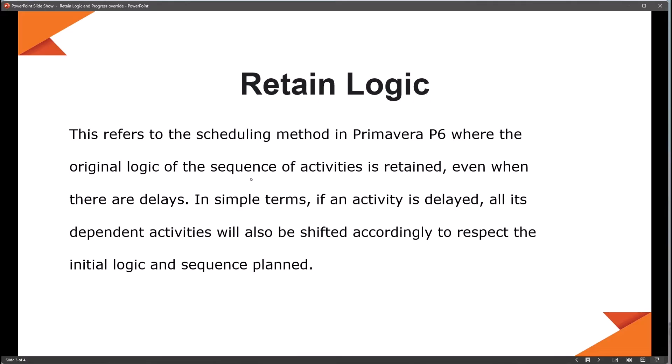In simple terms, if an activity is delayed, all its dependent activities — that's all the successors — will also be shifted accordingly to respect the initial logic and sequence that was planned.